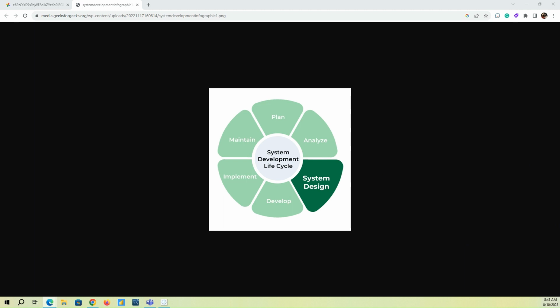Now, sixth, design review. Before you move to the design tools, you need to make a design review. You want to give this review to the customer, the stakeholders, the architect, and the developers, to make sure that all of them agree with this design, with the requirements, and that it is feasible for development.